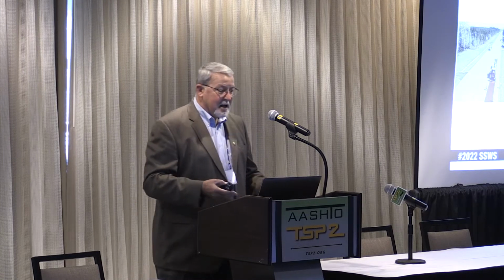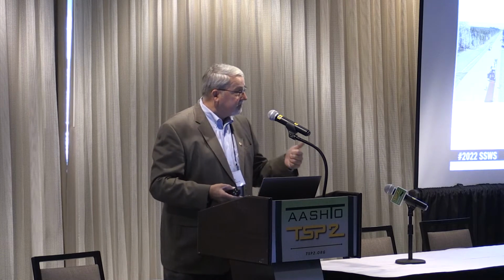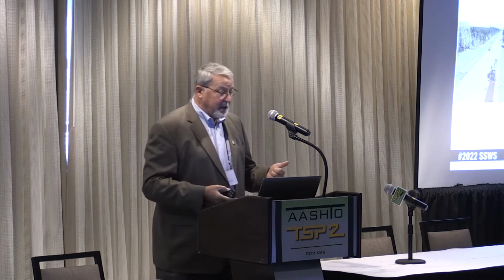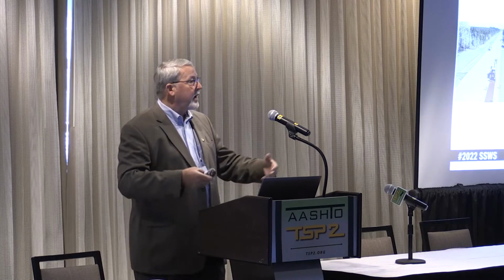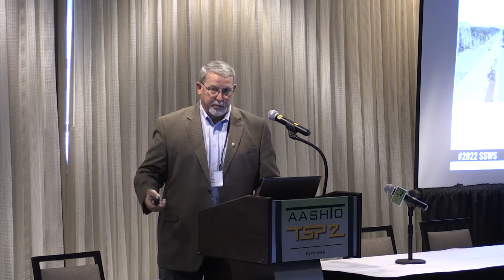And in most cases, when we perform them, we'll do say a full nurse truck, which will take us about 1,000 feet or so. We will stop. Everybody will look at it. I call it the kick in the rocks deal. And they'll do that, and within about an hour, they say, yeah, everything's looking great, and we'll just proceed from there. So it's not something that you do one day and have to wait a 24-hour period of time before you proceed with the project.